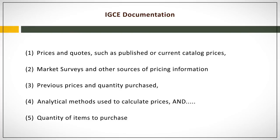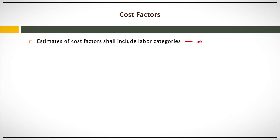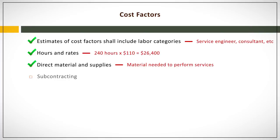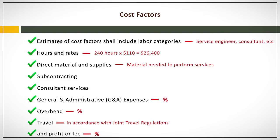IGCEs at cost level provide a breakdown of all costs anticipated in the performance of the contract. This should include a breakdown of all cost factors required, including an estimate of labor categories, hours and rates, direct material and supplies, subcontracting, consultant services, general and administrative expenses, overhead, travel, and profit or fee. Support for this information may come from an engineering or requiring activity's bottoms-up estimate anticipating the costs for the requirement, historical cost records for previous and/or similar contracts, and market research on the particular industry.